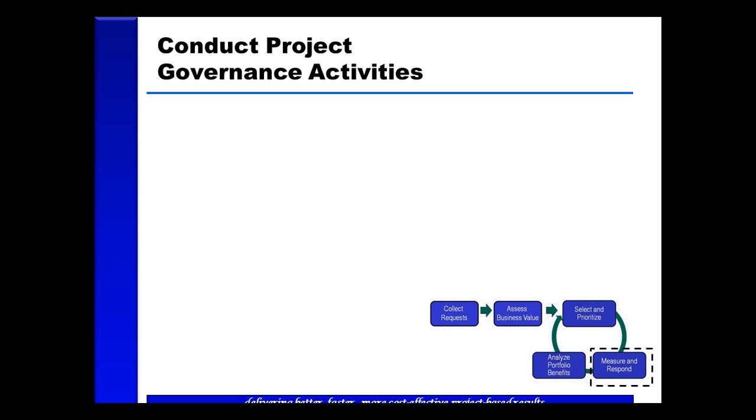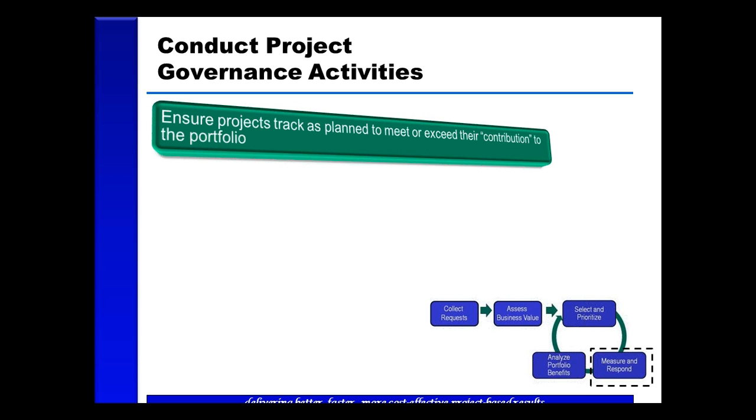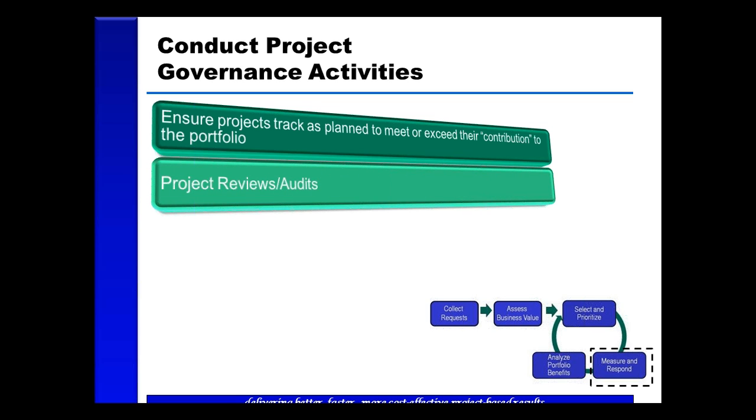Another critical aspect of project portfolio management in the execution phase is the governance of active projects. If projects are challenged or failing, additional investments may be needed, resulting in a reduction of the proposed return on investment for that project. For challenged projects, the financial return should be reevaluated to ensure adequate ROI for the company. Some projects that are severely impacted in terms of cost or schedule may need to be canceled. It's important that the executive committee governing the portfolio has that authority. To minimize losses, projects and the entire portfolio should be evaluated on an ongoing basis.